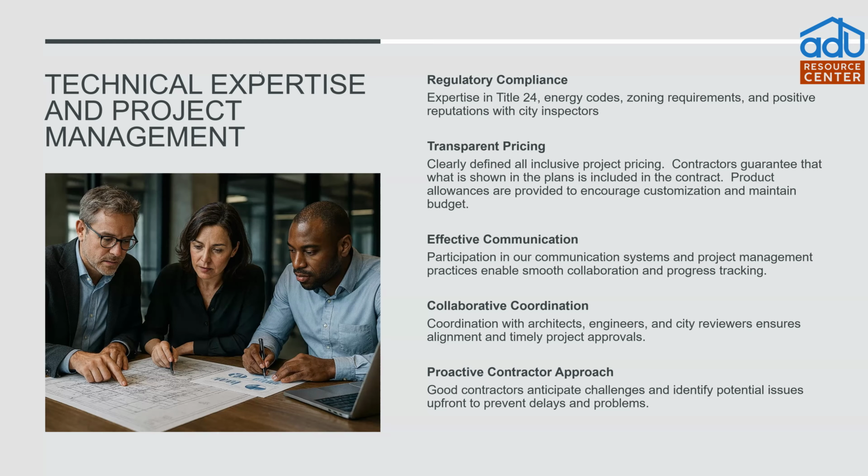Sometimes they leave a bit of detail out to make sure that the plans can progress through the city really quickly. But if it moves to a contractor that doesn't see that this was left out just to make sure it went through fast, and it isn't caught at construction, it could be a problem a little bit later. One of the things that I talked about with the stormwater runoff, that's one of them.